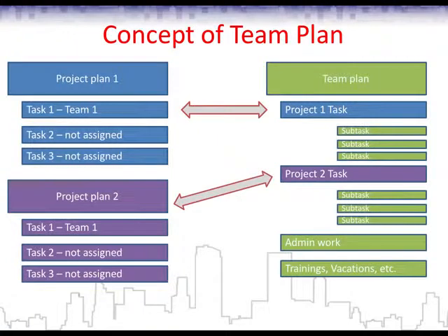If a project manager assigns a WBS element to a team lead, and now the team lead is responsible for delivering a certain WBS element on time, then the team lead is responsible for planning, for managing, for assigning resources, updating resources on this WBS element. Then a project manager can focus more on the results of the whole project, on the risks, etc., without needing to juggle people from other departments. And most of my clients enjoy this style of work. And I think that Project Server should support this as well.